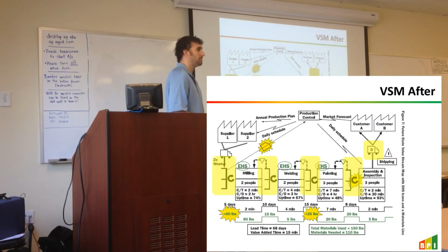And after you do the current state map, you're going to hear those things pop out. And we're going to capture those and highlight those with these burst symbols. And we're going to come up with a plan. So those would be listed on the current state map. So you do the current state, then you put these burst symbols on there, like too much inventory, scheduling problems with staff, customer complaints, rework loop, poor yield, and all you're doing is listing the problem or the opportunity there.